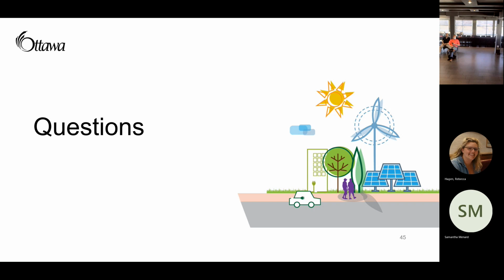Design is not complete for an SB10 model. The SB10 model might not be exact. So if there's a percentage change, the city would not have an issue with that, I'm assuming. Yeah, as long as you're hitting the target, it's not a problem. You can have a little bit of change. It's sort of similar to other stages in design. You submit for your permit, there still might be some changes that happen during construction, and you're just clearing those to make sure you're still hitting the design intent. So that would be okay.